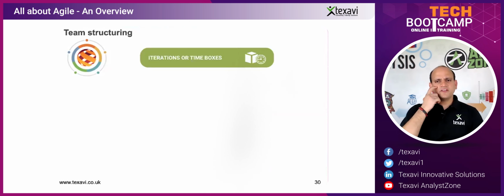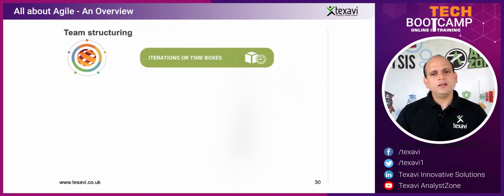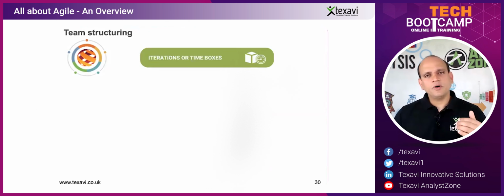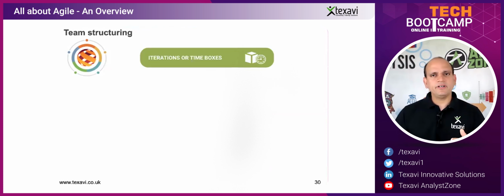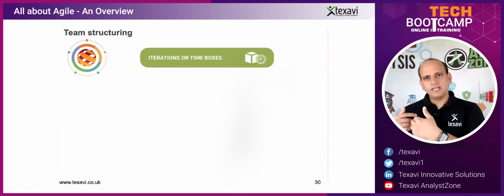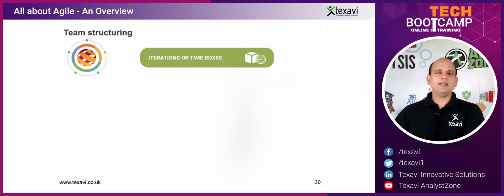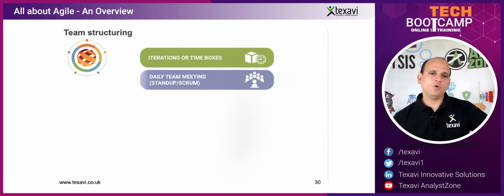Of how you're structuring the teams, again, with Agile, it's all about time boxes. We're talking about iterations. We're talking about sprints, the 2-week, 4-week sprints, right? We were talking about that. So the 4-week sprint is called a time box. Within this sprint, whatever you're trying to work on gets into the product. And then after that, if it's tested, if it's working fine, then you can release it right after that. You don't have to wait for 1 year, unlike the waterfall.